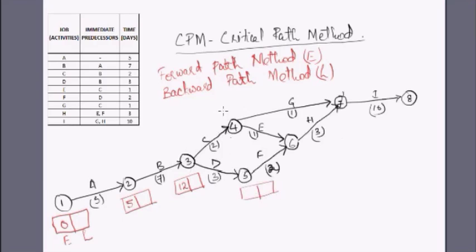For activity C there is just one activity coming into node 4, so we add up: 12 plus 2 equals 14 — on the fourteenth day we arrive at node 4. For activity D: 12 plus 3 equals 15, so on the fifteenth day we arrive at node 5.